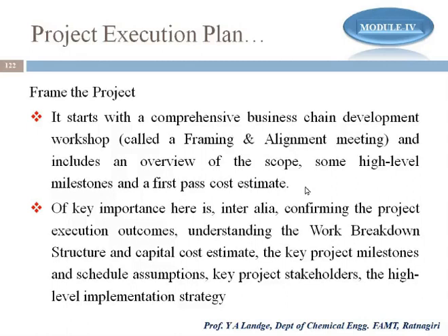Of key importance here is the inter-ally confirming of the project execution outcomes, understanding the work breakdown structure, capital cost estimate, key project milestones, schedule assumptions, key project stakeholders, and high level implementation strategy. So in the framework, we need to have the answer of the WBS, that is the work breakdown structure, then the capital cost estimate.